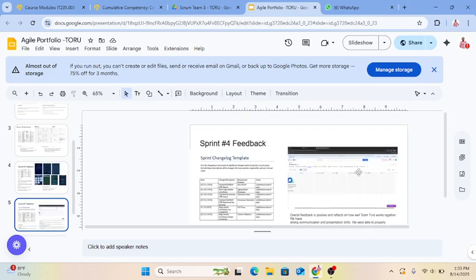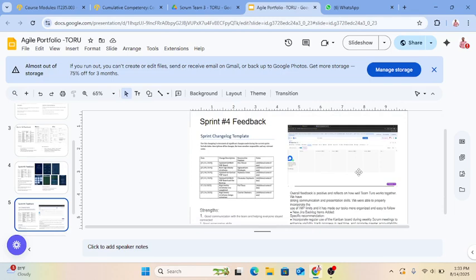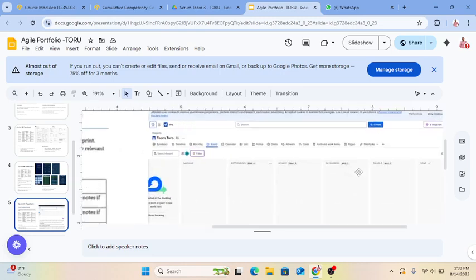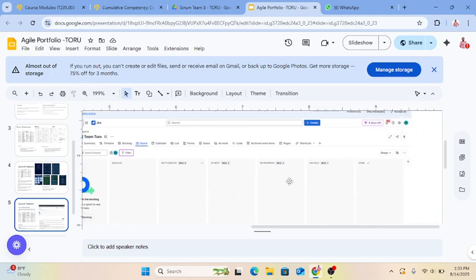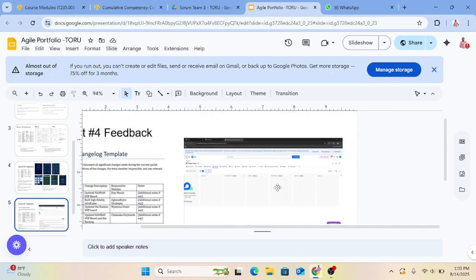And then here, to make our work easier during this sprint 4, we decided to add WIP limits, and we know that these are the limits we can put on each task. So here we made bottleneck, up next, in progress, on hold. For bottlenecks, we put a limit of max 6, and then up next a maximum of 3, in progress maximum of 3 also, and then on hold we set it to a maximum of 1.